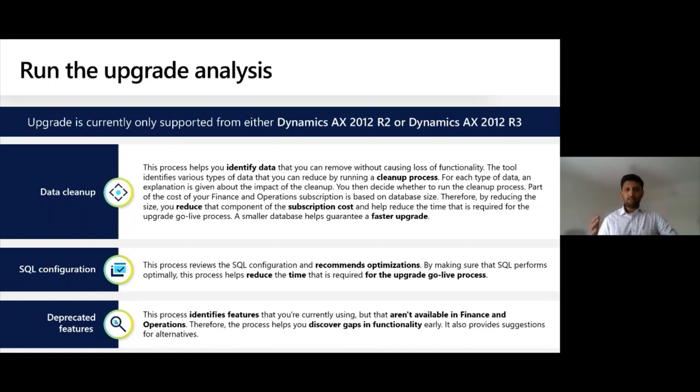that you have in a D365 environment is the size of the database too. So if you get an opportunity to clean up your database in your AX 2012 environment, it will give you an advantage when you move into the D365 environment. And also, because the database size has been optimized now in 2012 itself, your upgrade to D365 will be faster. This upgrade analyzer also identifies the SQL configurations that can be optimized so that you can perform your data upgrade